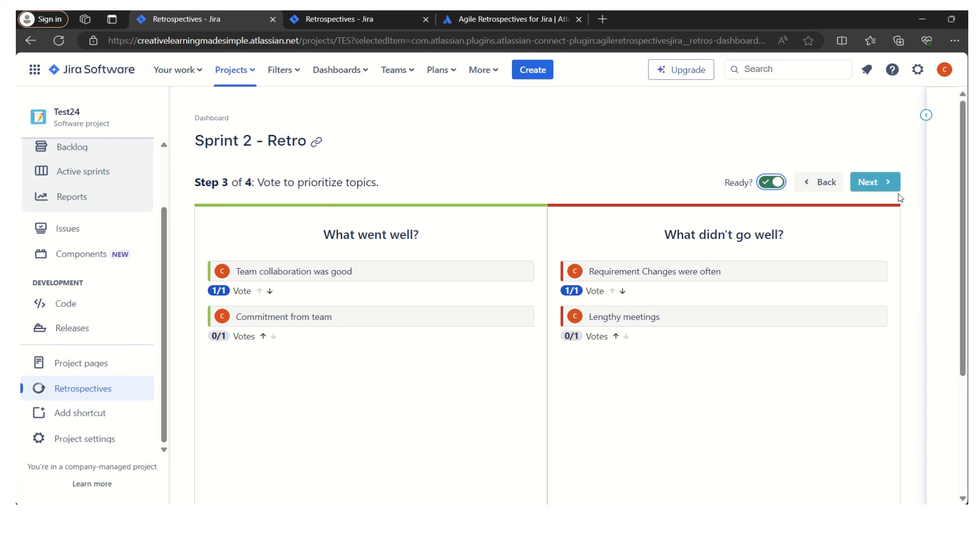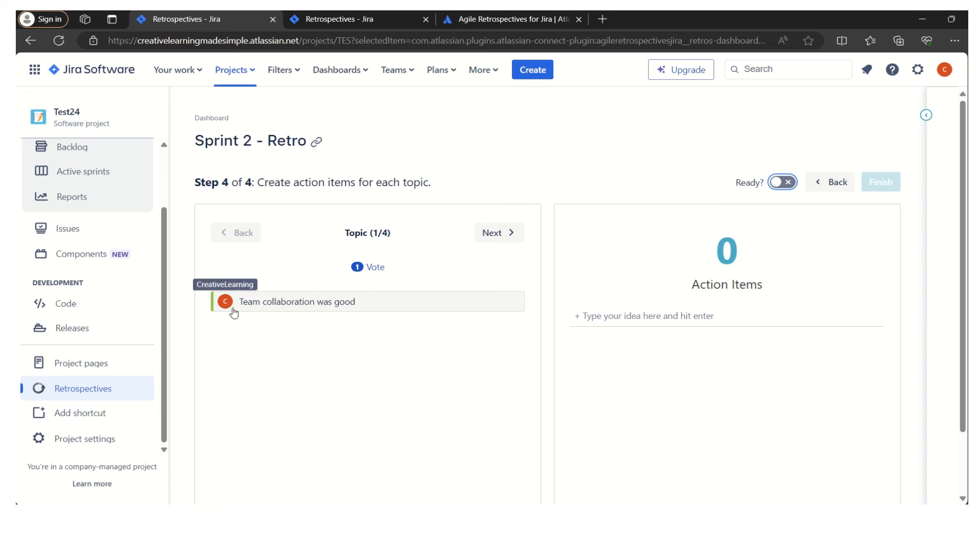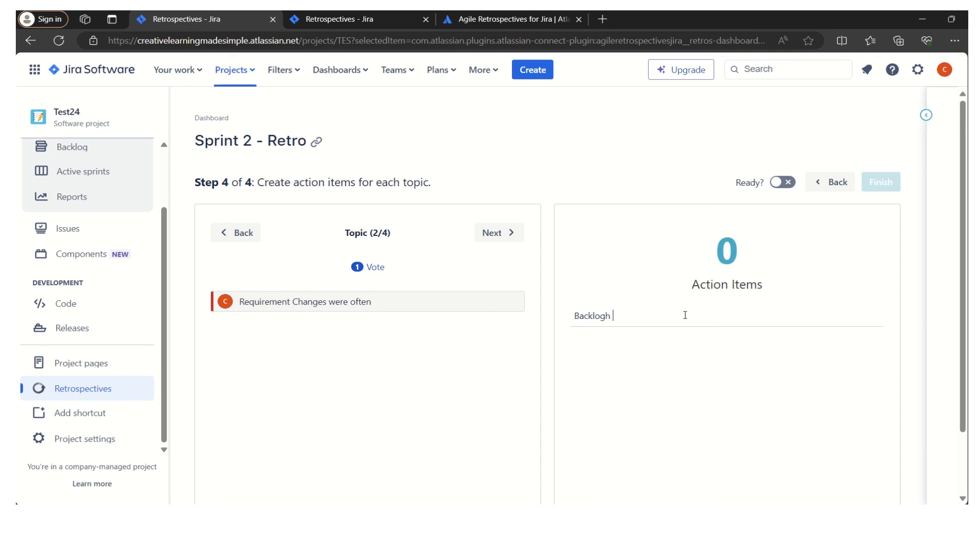Here we can see the topic. What we can do is it says create action items for each of the topics. The items or the ideas where maximum members have voted, those will be listed here. This is fine because this is a positive thing. Let's go to the next. Requirement changes were often. Maybe for this I can create an action item which is basically backlog refinement meeting from next sprint.